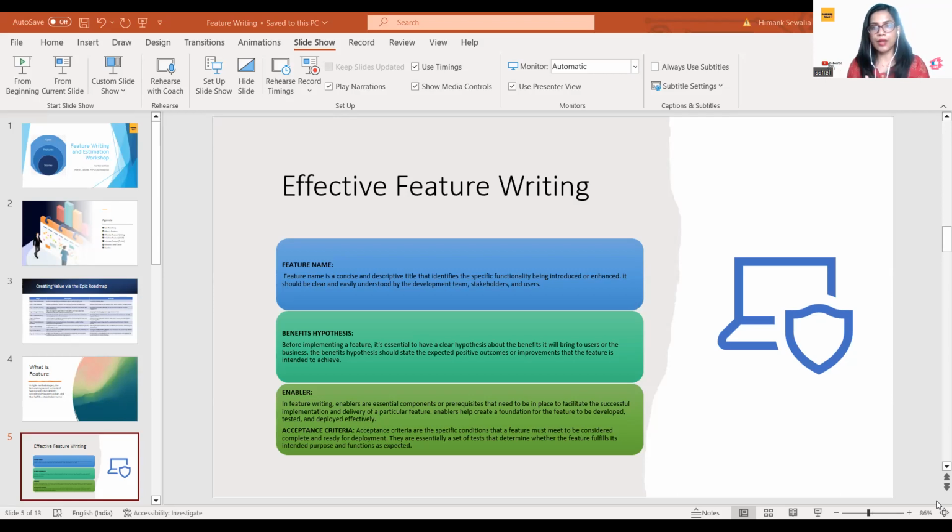Okay, another example is, any functional features you are delivering, but maybe some automation test environment needs to be built, some test suite needs to be built. So all this comes under enabler. An enabler may not be directly impacting the end user, however it is enabling functional features which at the end of the day will bring some value to the end user once delivered to the customer. So that's why we call it an enabler.